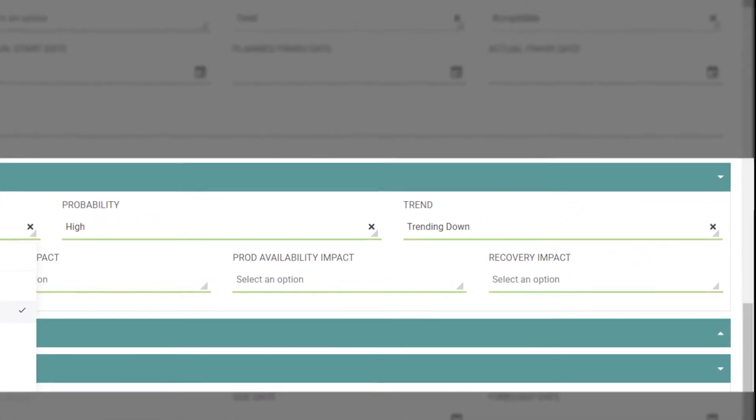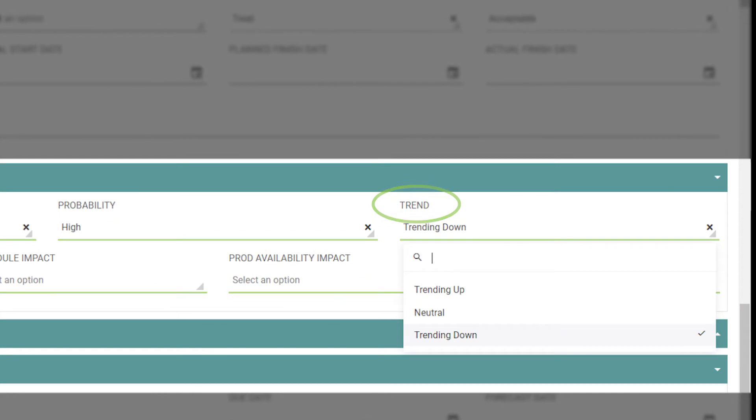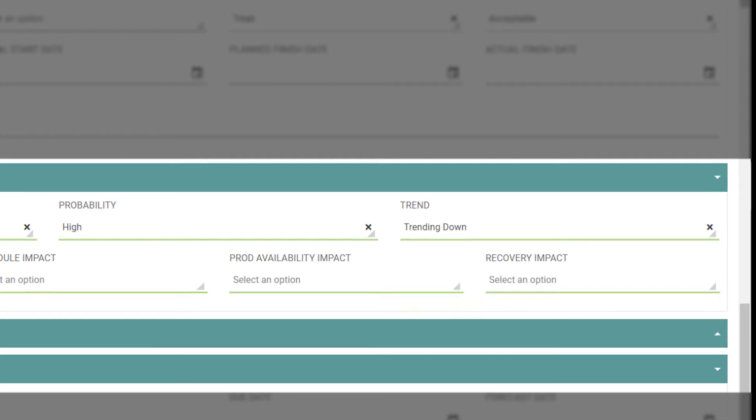This is also where the trend of the risk is marked. So, if it is trending up, that indicates a higher impact and or probability. Trending down means a lower impact and or probability. Trending neutral means, as you guessed it, trending the same as when the risk was originally identified.